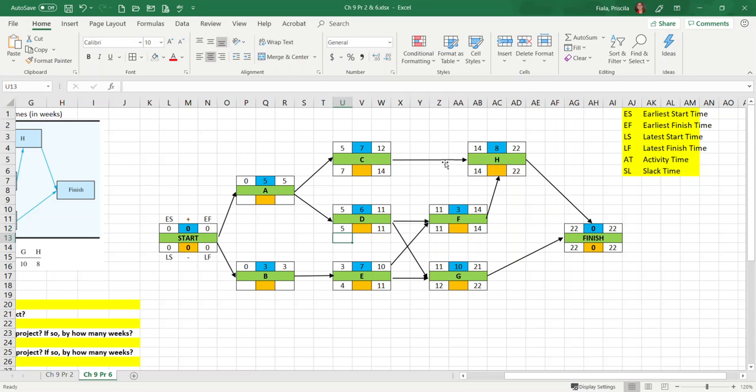Okay, now I have done this one in advance, so we're almost done. Hang in there. Let's go through B. For B, you only have one possible one, which is right here, which is 4, right? So then you're going to do equals 4 minus the activity time, which is 3, correct? And for A, you have 2. Which one is the lowest? It's 5. So we're going to do equals 5 minus 5. And you have completed this part.